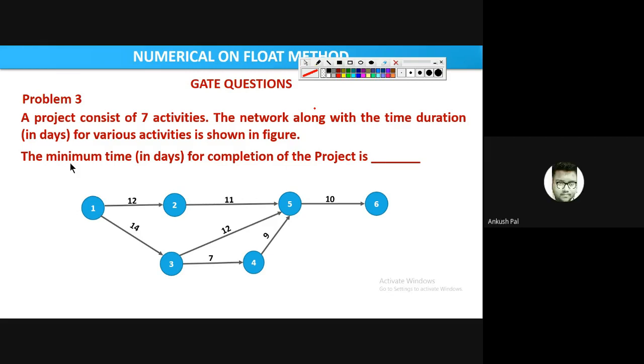There will be only one term, which is critical path. That means if you make any delay in those activities which are in that critical path, your whole project duration will be delayed. That's why it is critical. The main aim was what? To determine the project duration, and to identify which activities are critical. That means there will be no delay; we cannot delay such activities. We have to take precise care on those activities so that our project might not get delayed.